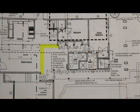So once we're on the job, after we're done doing the scopes of work, then we can create the owner's responsibility sheet. How we do this is we go through the plans, we look at every single room that we have in the plans. We detail out what's in every single room. So for example, on a bathroom, we'll do the faucets, the sinks, the cabinets, the style of cabinets, the tile that we're going to be using, niches if they're in the bathroom, toilets, etc. There's a ton of different stuff that we have to have picked out for the project.